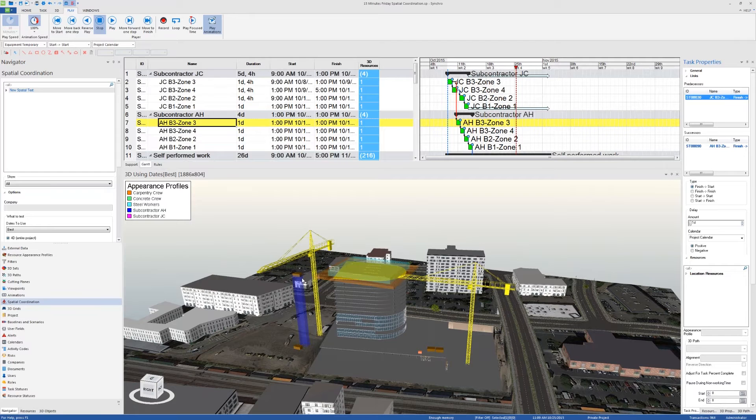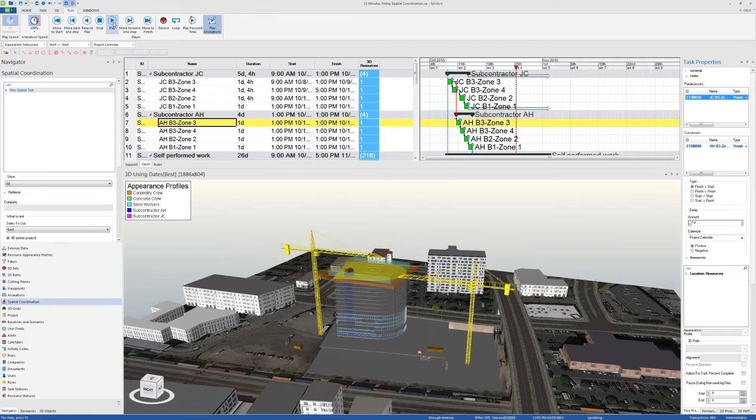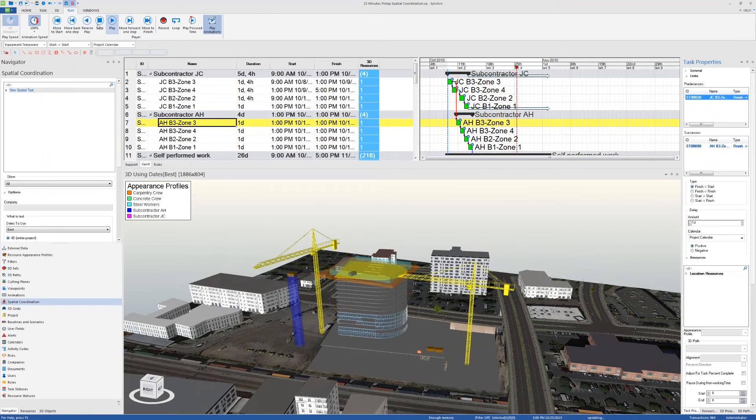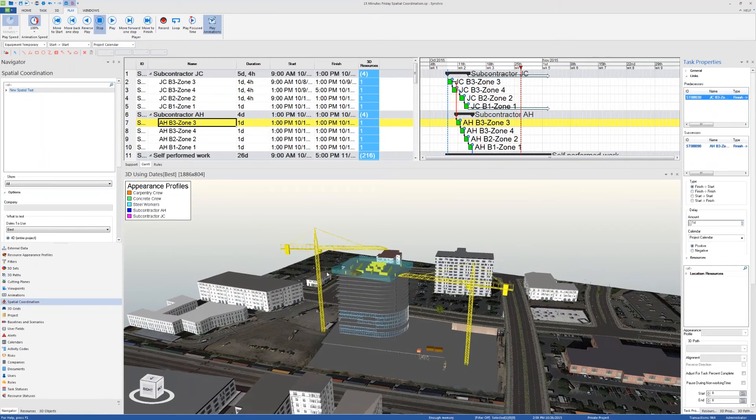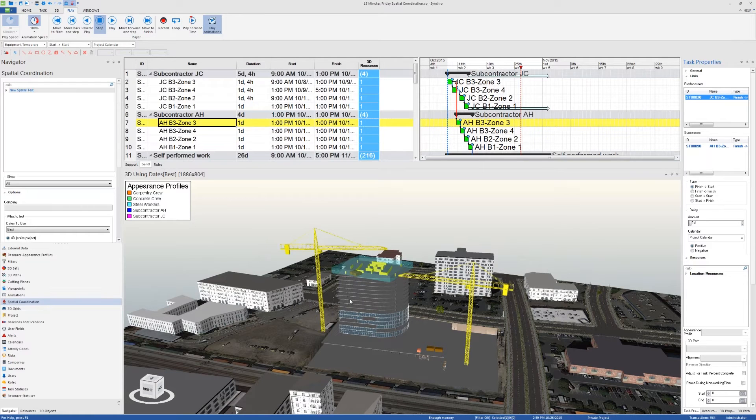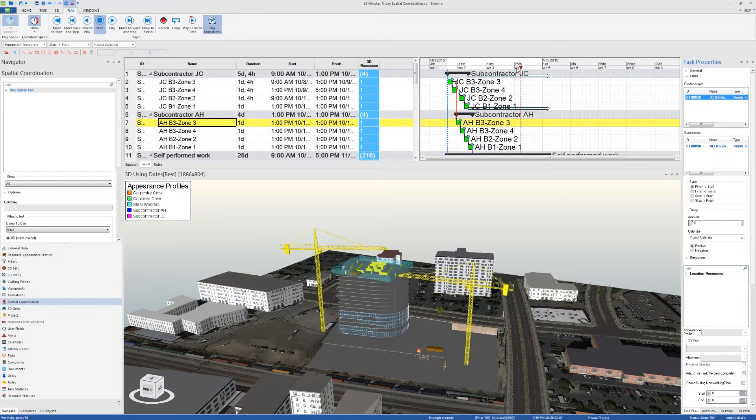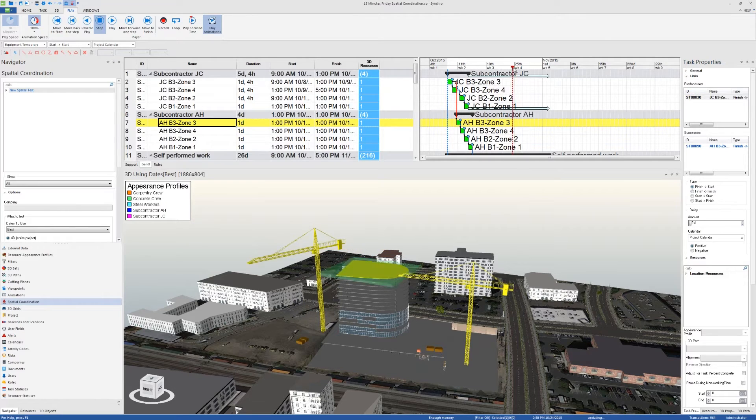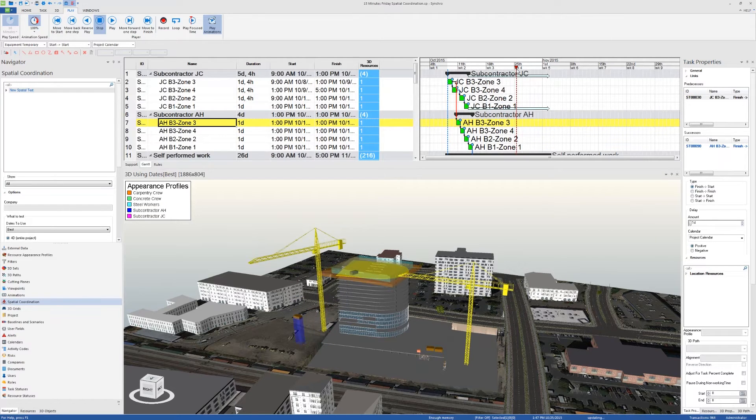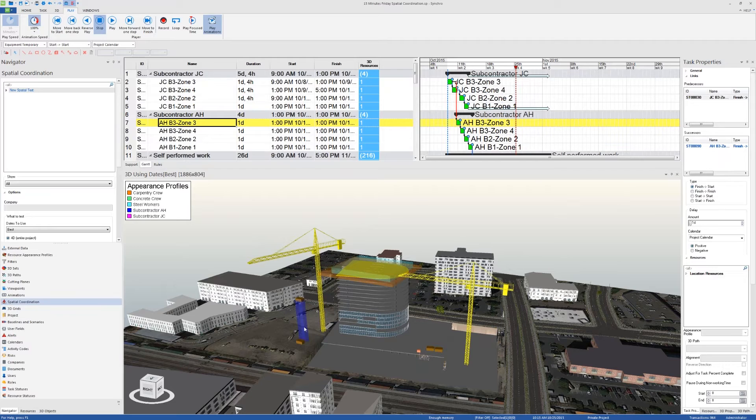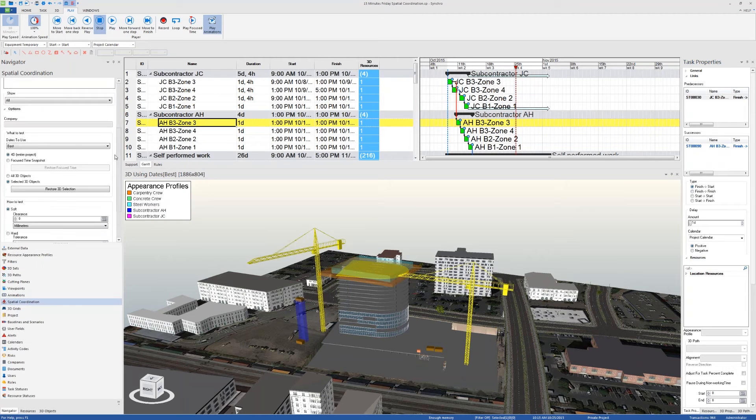So this is basic clash detection, but what you can see right here is that there has been a clash that is not detected, and that's because it's associated to a 3D path. What I did here was that I assigned this workspace to the box that's moving to the same 3D path so I can see the footprint and see if something happens, if there's a safety clash down there.